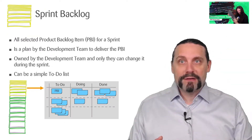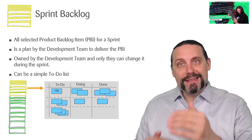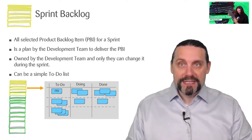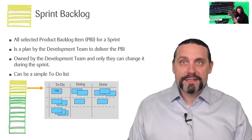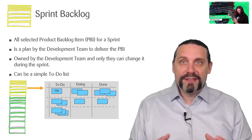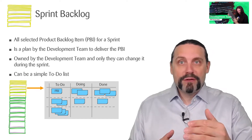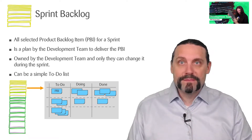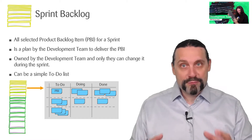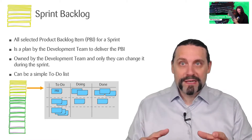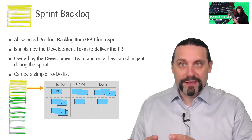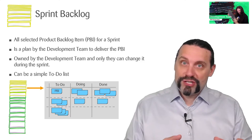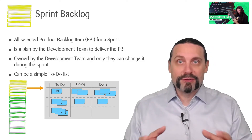A sprint backlog is just a selection of product backlog items which are going into a sprint. This sprint backlog is nothing else than a plan of the development team to deliver these product backlog items. The sprint backlog is completely owned by the development team, and only the development team can change the sprint backlog during a sprint.